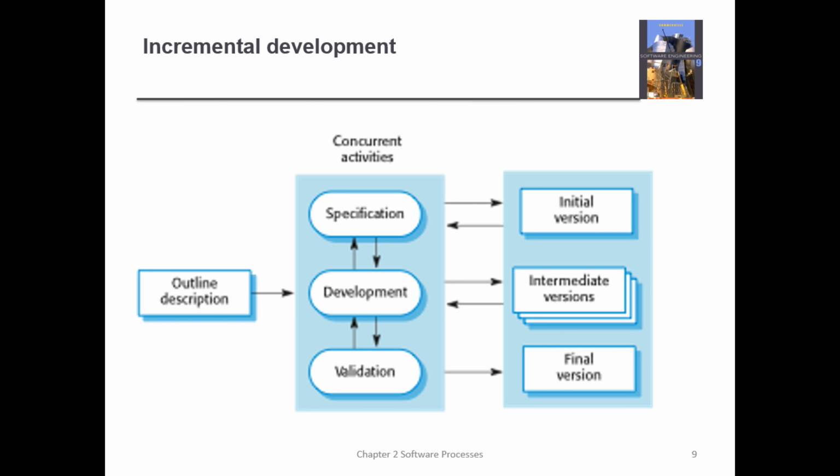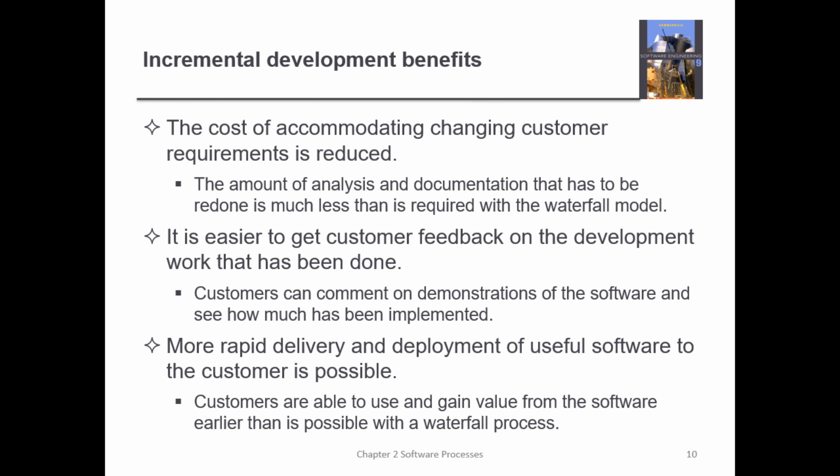So that's incremental development. Because each increment is a version that has functionality, whichever requirements you begin with, you have to ensure that you have understood them well. With incremental development, there are several benefits. The cost of accommodating changing customer requirements is reduced. Since you've already catered for this, if the customer changes the requirements or adds more requirements, you reduce the cost, other than the waterfall model, whereby you have to do everything afresh.